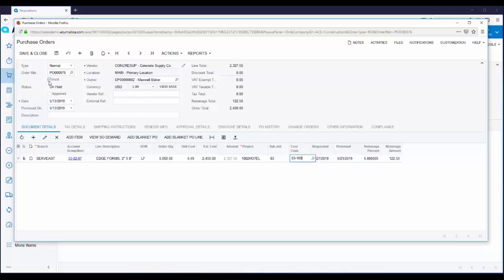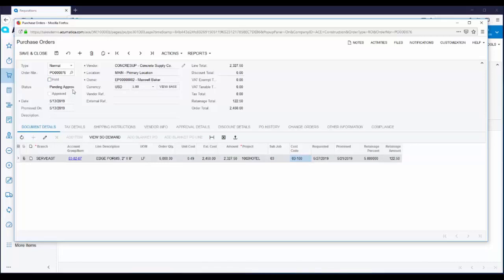As soon as I take this purchase order off hold, you'll notice the status changes to pending approval. This is because I'm enforcing approval of all purchase orders. In Acumatica, approvals are driven by approval maps. Approval maps let you set the rules and conditions for approvals. You can set an approval map based on the employee that entered the purchase order. It could be based on the dollar amount, could be based on the type of product being requested. And all your approvals will be auto routed to the correct person.